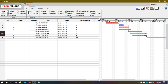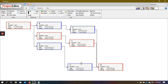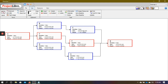We could play with B. Let's suppose we take B and change it from three to four days — we have just added one day. So I just changed B from three to four days. Now, does that make any difference on the diagram? We still have the center path in red color, and the two paths at the top and at the bottom are still in blue color. So this tells us that by delaying B by one day, this path is still non-critical. If you add five plus four plus six plus eight, that comes out as 23, because this was initially 22 days and has now become 23 days. So the project's duration has not changed — the ending date of the project has not changed at all.